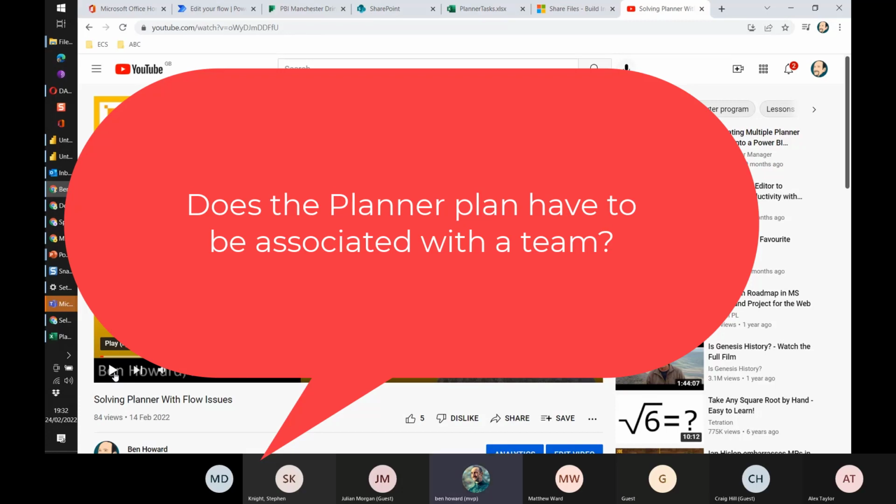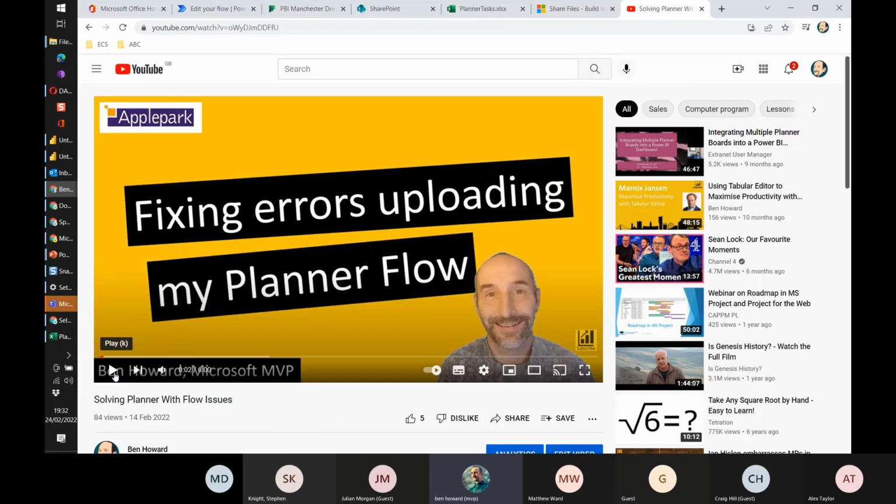Yeah. So the caveat is you can create a Planner plan and not associate it with a team. Bizarrely, yeah, or an Office 365 group, but we've got to go and look at Teams. So your Planner plan has to be associated with at least one team. It has to have that association.